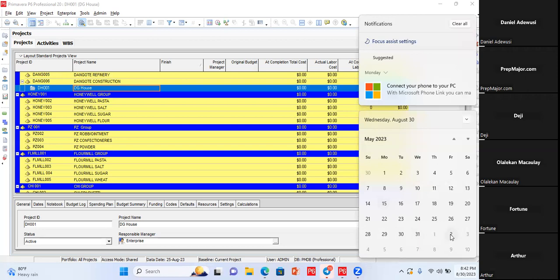If we take the 1st out, it will fall on the 3rd because we counted 1st of May, which is supposed to be a public holiday.